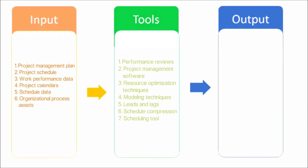Resource Optimization Techniques: Resource optimization techniques involve the scheduling of activities and the resources required by those activities while taking into consideration both the resource availability and the project time. Modeling Techniques: Modeling Techniques are used to review various scenarios guided by risk monitoring to bring the schedule model into alignment with the project management plan and approved baseline. Leads and Lags: Adjusting leads and lags is applied during network analysis to find ways to bring project activities that are behind into alignment with the plan.